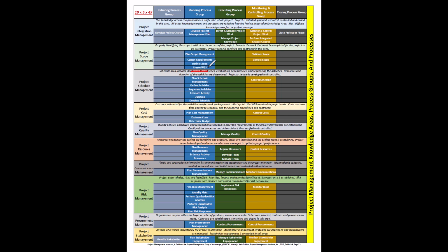All right, so now I have created my WBS. I have assigned index numbers to the branches and to the work packages. I have a title. I'm now going to start working on some duration estimates, and then later I'll work on some cost estimates for those work packages. But I should also have a companion document to the WBS, which is called the WBS Dictionary. The WBS Dictionary contains all of the details about that work package.